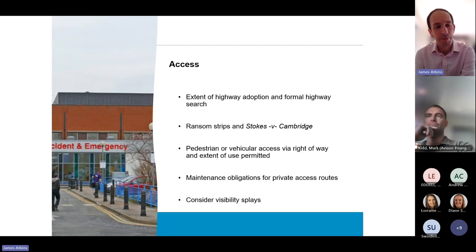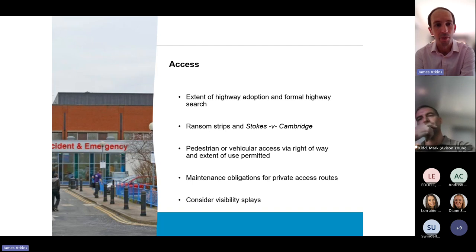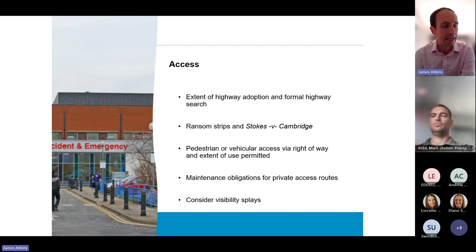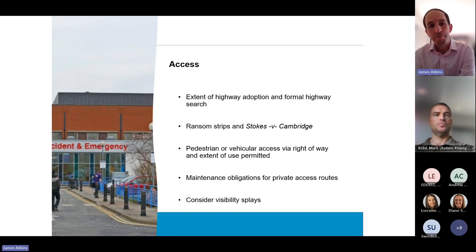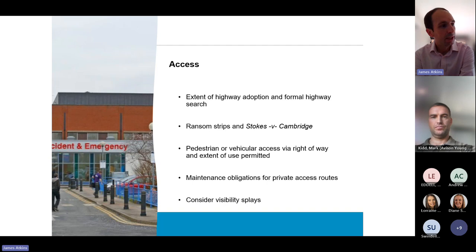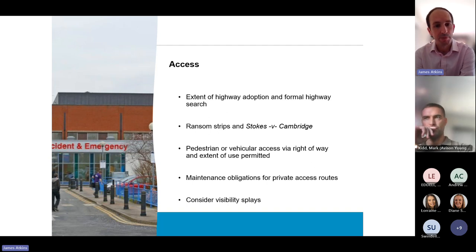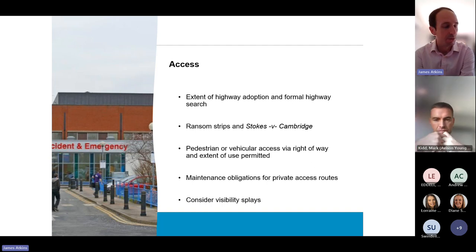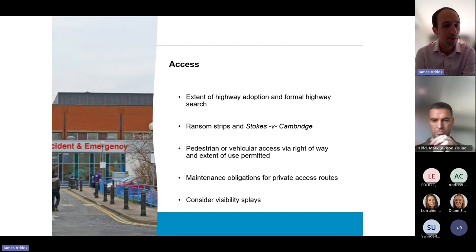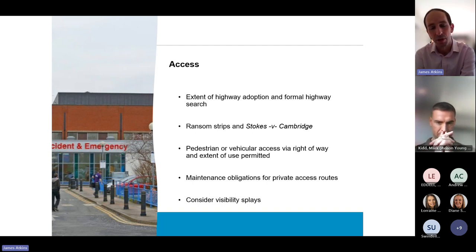You can't assume that you can upgrade a right of way or start using it for a different purpose without the permission of the owner of that land. We've certainly seen trusts saying they're going to reroute the main access through a road where they've only got a right of way — they don't own it, it's not highway, so putting the main A&E access by that route just won't work. Think also about maintenance obligations for private access roads, and things like visibility splays — you can't assume your connections into the highway will remain as they are.